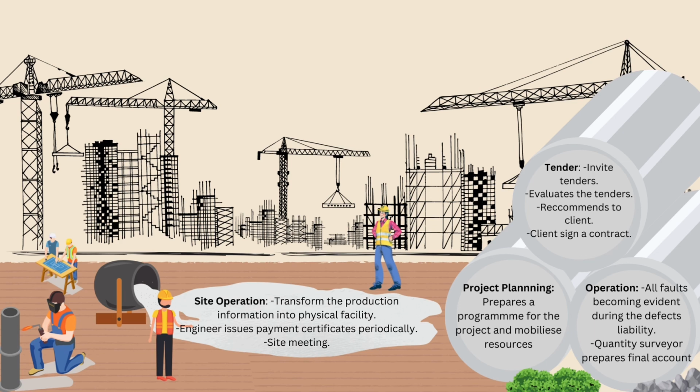8. Operation. All faults becoming evident during the defects liability period are made good by the contractor. The quantity surveyor prepares the final account for the project. The client arranges for the management and maintenance of the facility. A professional estate management consultant may be retained.